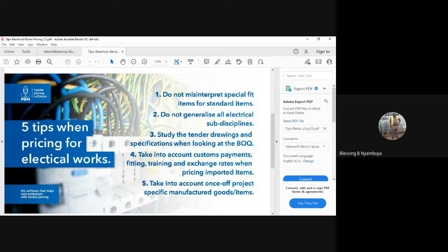You need travelling, you would need air tickets, you need all those things. All those things need to be filtered into that rate, because there are certain items that will not be dispatched without having gone through certain QA processes, and the factory acceptance test is one of them.